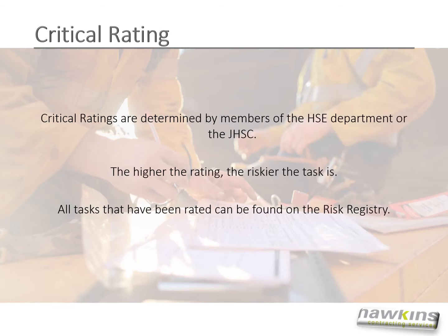Those critical ratings that identify critical tasks are determined by members of the Health and Safety or Environmental Department or the Joint Health and Safety Committee. The higher the rating, the riskier the task is. All tasks that have been rated can be found on the risk registry.